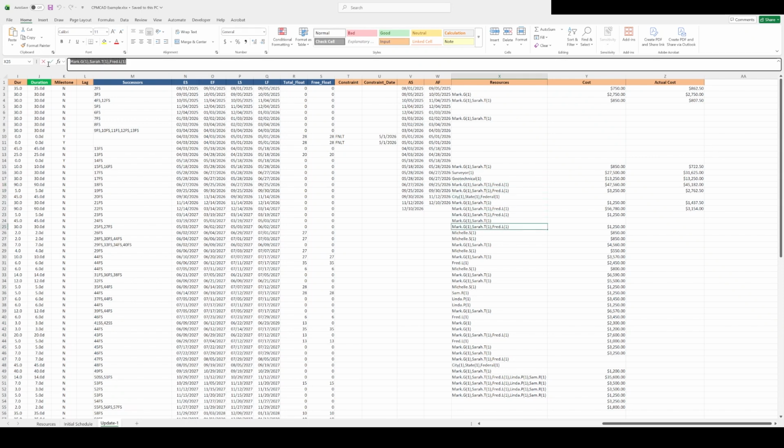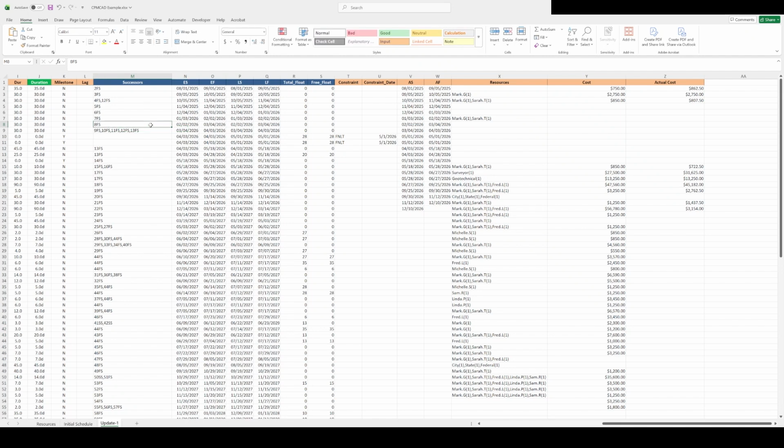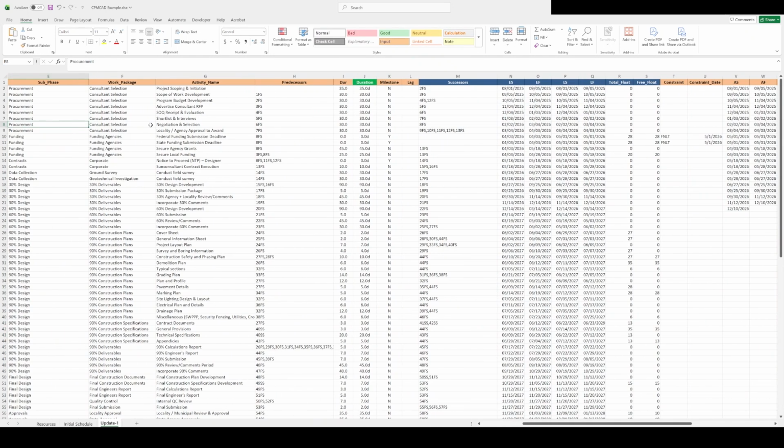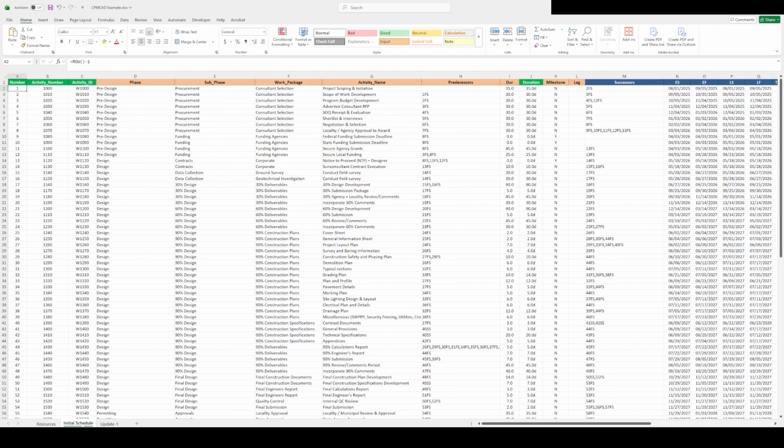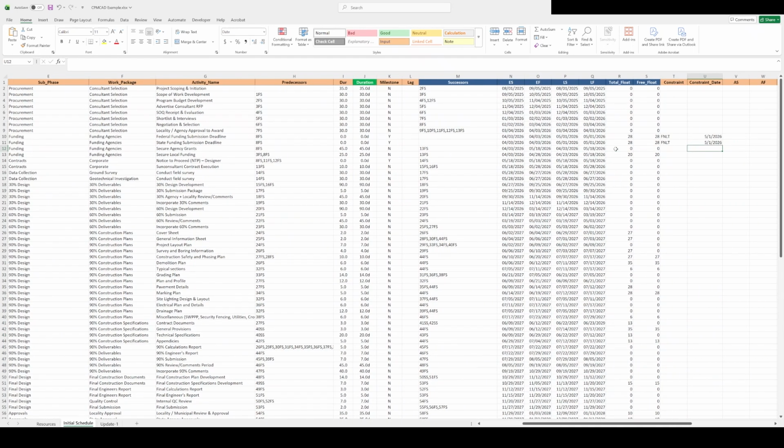Second, keep your Excel file closed when you load it into CPMCAD. Excel locks files when they're open, and CPMCAD needs read access. If you're making changes in Excel, save and close before switching to AutoCAD. This also applies when saving results back. After you calculate the CPM, the successors, early start, early finish, late start, late finish, total float, and free float values can be pushed back into Excel using the Save to Excel button, but your spreadsheet must be closed for that to work.